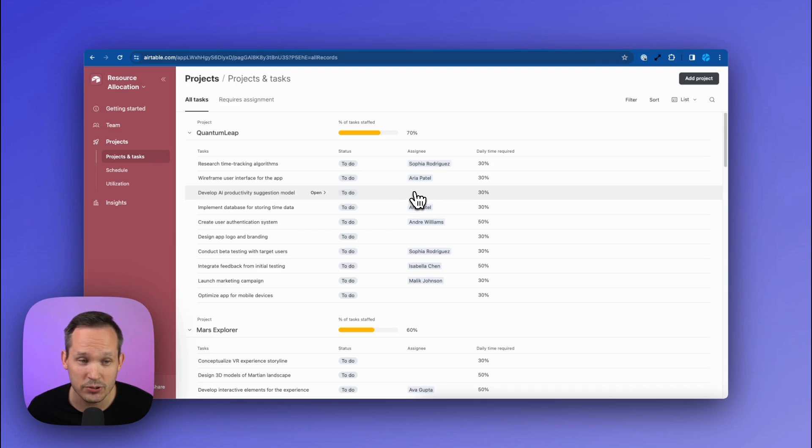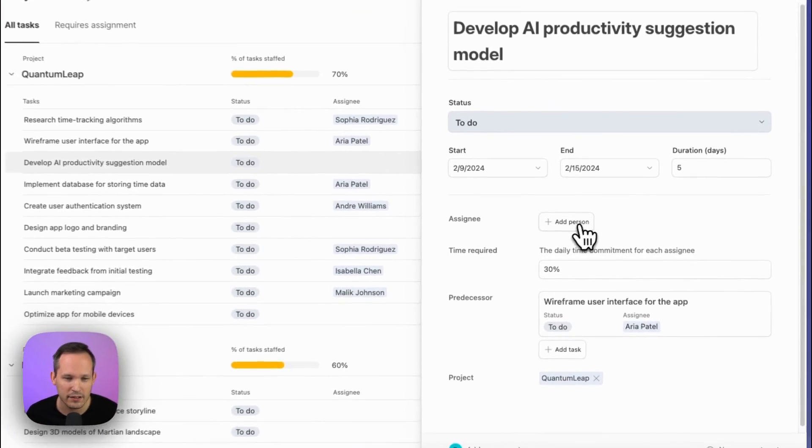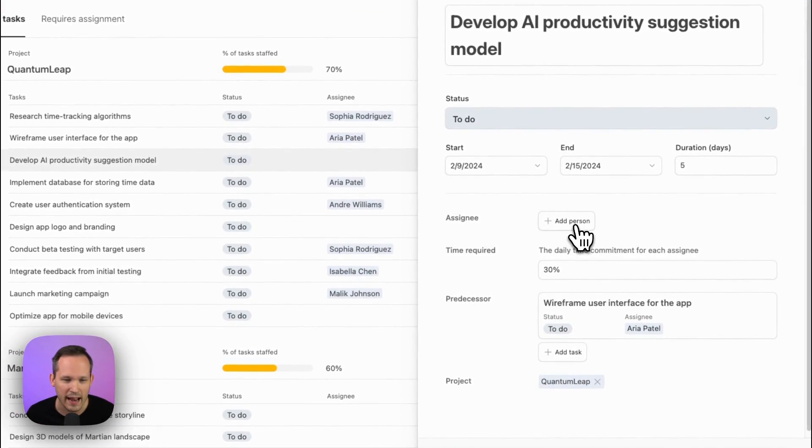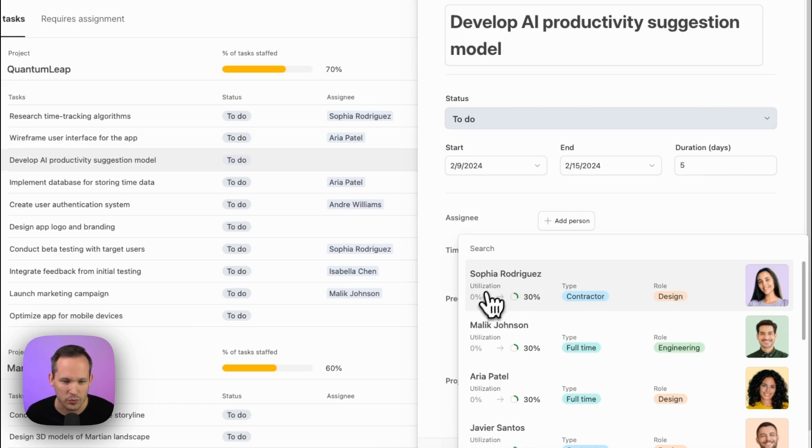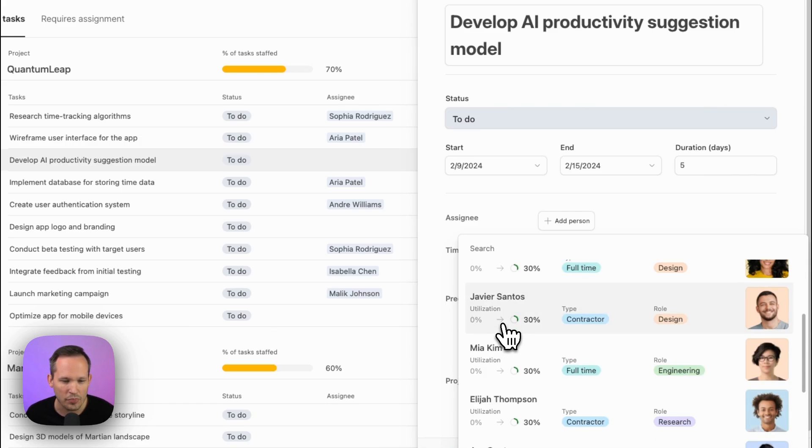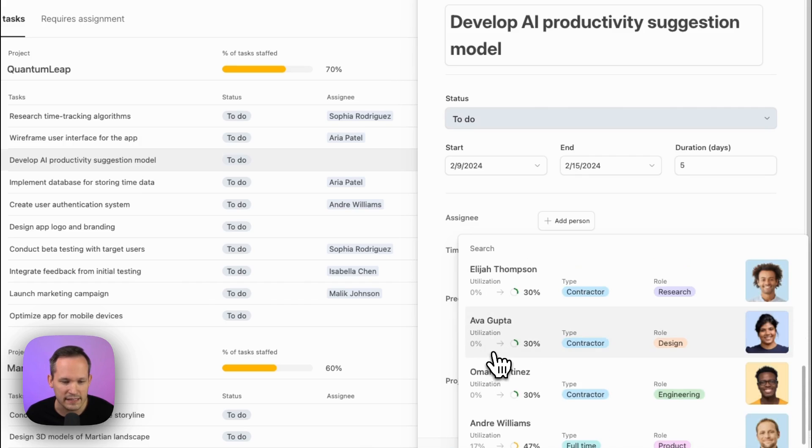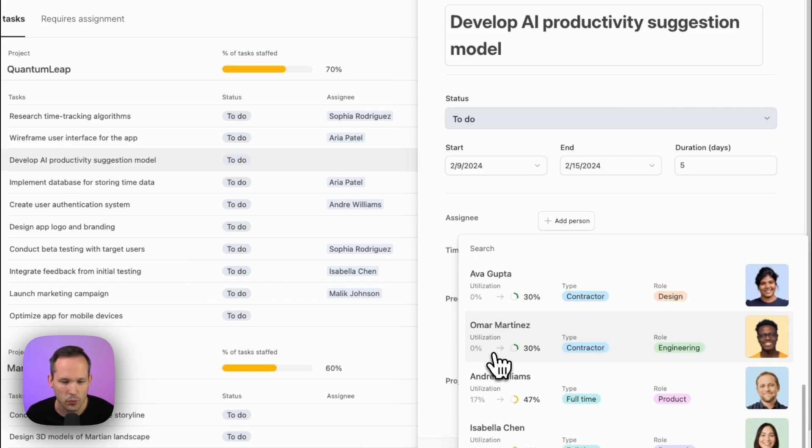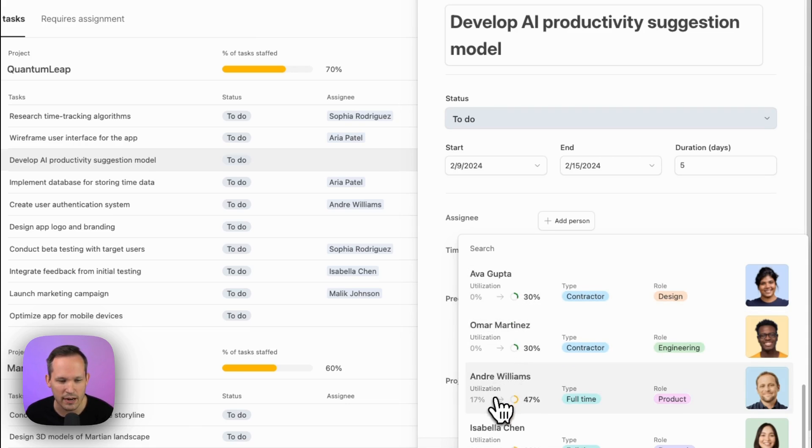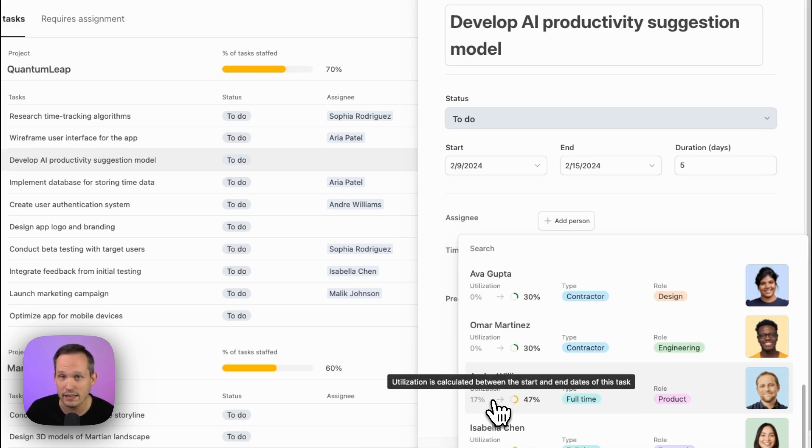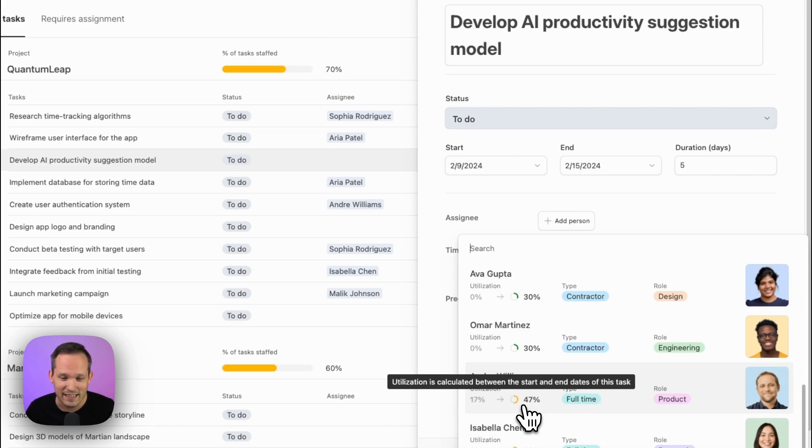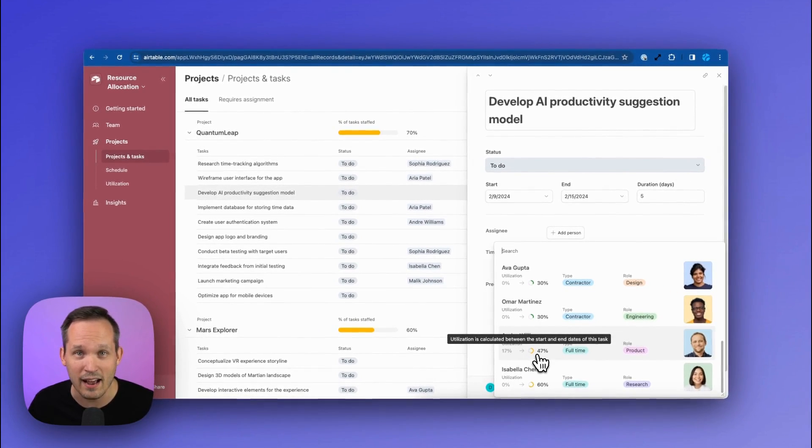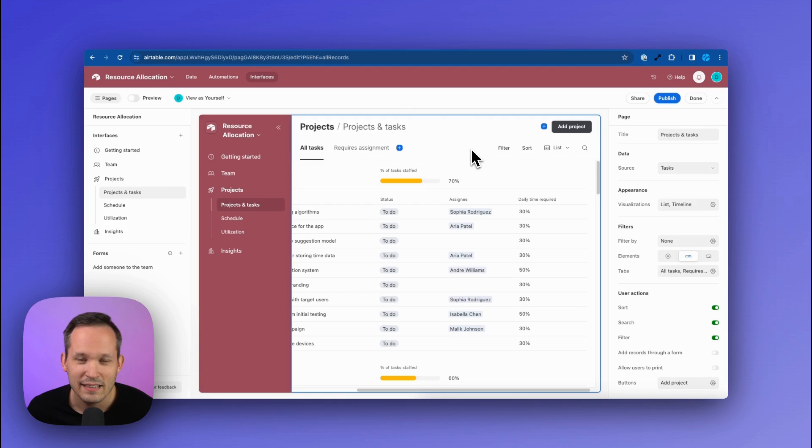So if I see this task and I know I need to resource it, I can open up the task here. And here's where we can add this assignee. And this is where we see a preview of our different resources. And this is the new function we're talking about here. We can see that utilization, we can see what they're currently at, and then by assigning this task, what that would take them to. So these folks right now don't have anything going on, they go from zero to 30%. We can see Andre down here is already at 17% for this period of time. So adding this task to his plate is going to take him to 47%. So this is how we can keep a better eye on how we're utilizing our resources.